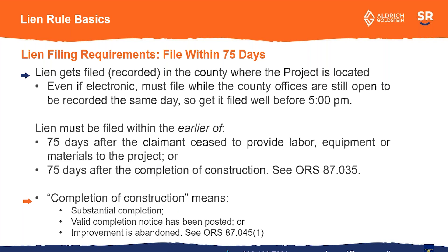When does the 75 days run? In Oregon, it's basically 75 days after you cease to provide labor, equipment, or materials, or 75 days after the completion of construction, whichever is earlier. That's why you want to get in early within that 75 days so you're not depending on whether it was the last day you were on the project or when the project was completed. The completion of construction basically means the project is substantially complete, or a completion notice has been posted, or the project has actually been abandoned. There is a way to show legally that the project has been abandoned, which is a more recent requirement for situations where the project is never completed.